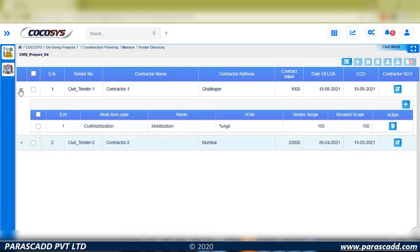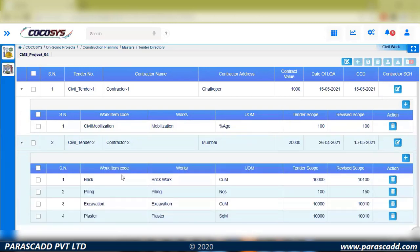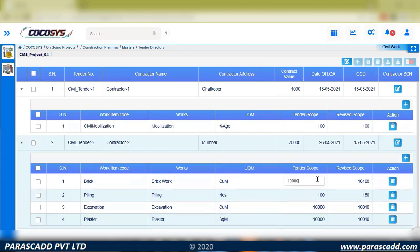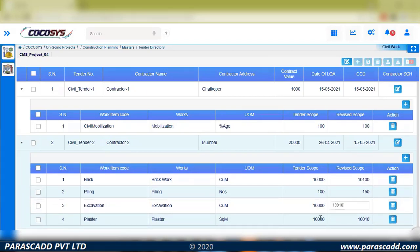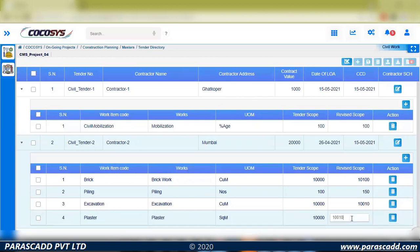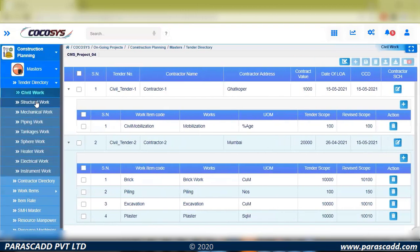I'll click on the contract and we can see the items. The second contract is for piling work, excavation, and plastering. Against each individual item we have scope and revised scope — this is where we define the scope quantity. Individual contracts are available, and within each contract work items are defined with scope quantities and units of measure already predefined.